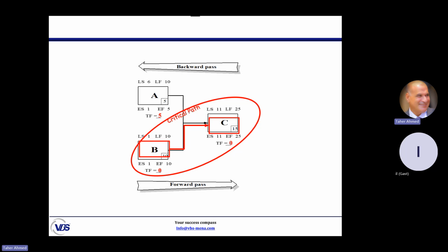This is how to determine critical activities in your schedule. As I told you, those formulas are built into Primavera, so you don't have to bother yourself. Why do I teach the theoretical part? To understand the meaning of critical. Critical means that the activity has no total float. It has 0 or less. And the green bars mean what?